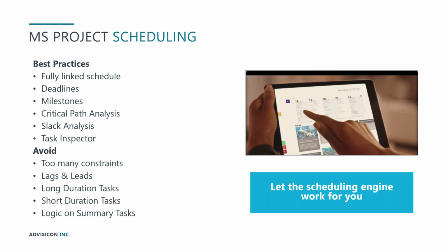Again, that's a situation where I don't actually care at exactly what time a task is scheduled to start and finish. I want to know on which day or in which week it's being performed. And in that way, if I've got multiple tasks being performed during a day or during a week, I can schedule them in parallel with the same starting date and the same finish date, and then progress can be reported on those tasks independently of each other.